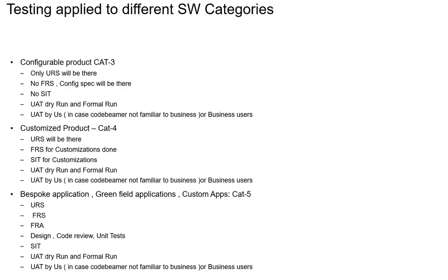We have to go for the URS. If you go and say that, as part of my test strategy, I am going to do SIT, I am going to do a SIT dry run, and I will use the same test cases for your UAT, it is going to backfire big time for us. Never propose such things.